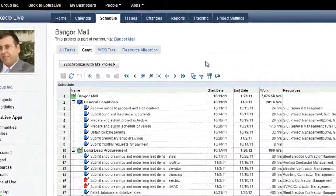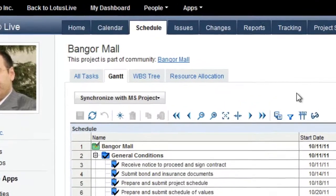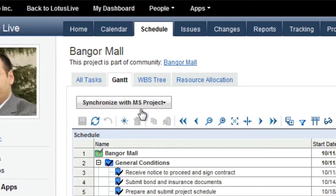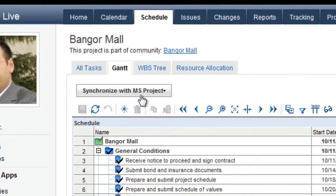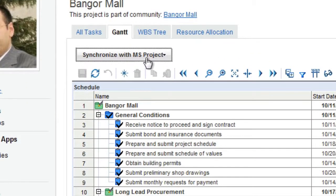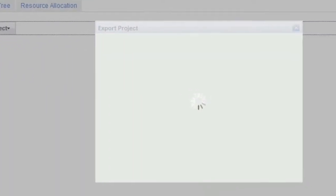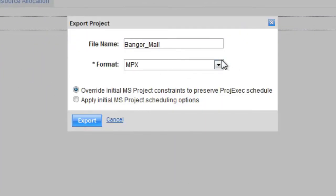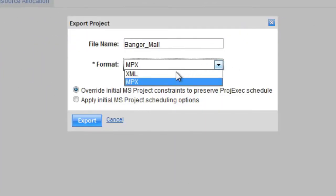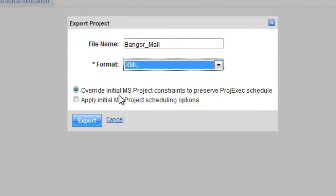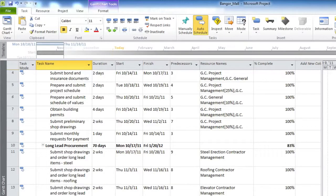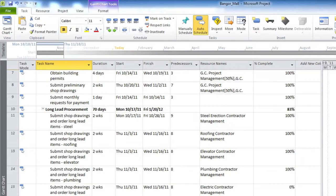To export or import with MS Project, go to the Schedule tab of your project and click the Synchronize with MS Project button, then click on the Export or Import link below. When exporting, you can choose to export as an MS Project file or an XML file. Once the file is exported, you can open it in MS Project.